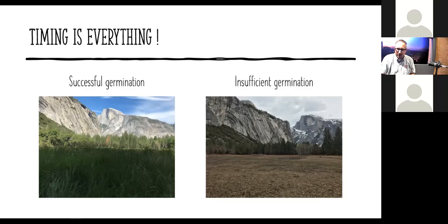So that's why they try to do the meadow restoration now. But by the time they're done, it is the end of October, the rains are starting, and especially in areas like Yosemite, it's starting to get colder, and you're just not going to get good germination, not sufficient enough to get an NOT.